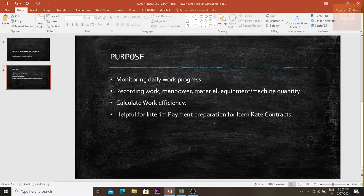What I used to do was collect all the DPRs from every team under each engineer and record each day's work. At the end of the month, I would get the cumulative amount of work done. For countable items it is easy — there might be a tag number, so you can confirm there's no repetition or duplication in your claims and understand what equipment or countable items have been installed on site.